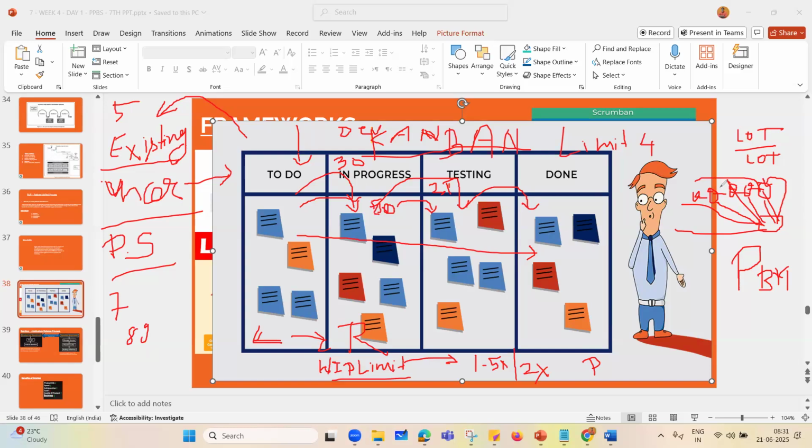They will do that. There might not be any chaos, right? Yes or no? Yes. Because everyone is taking care of everyone. There is very high team synergy. And they will also ensure they follow the WIP limit, which could be 1.5 to 2x. Yes or no? Yes. So they are taking care of the best practices, and based on those best practices, they are taking ownership and accountability of the delivery. So the pull-based mechanism is followed by developers, and the WIP limit is set. The Kanban practitioner has to make sure it happens.